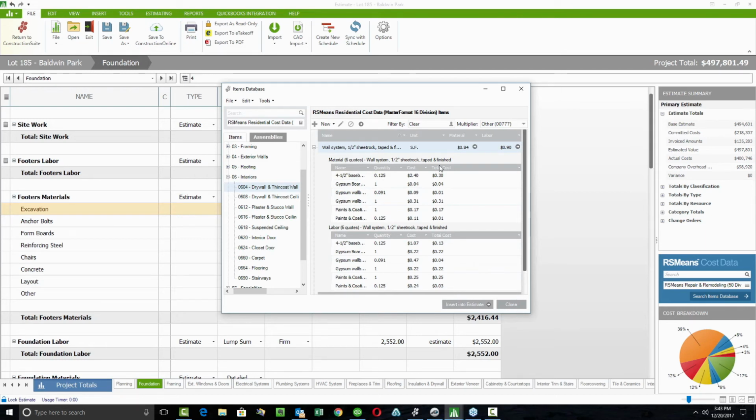We're getting a little bit specific, but if you just wanted to figure out your total cost for your interior walls, if we assume it's an 8-foot high wall, every 8 units of the assembly gives us 1 unit of trim. 8 feet high, 1 foot wide, so 1 linear foot of trim. For gypsum wallboard, we've measured this in square feet in the cost book, so 1 square foot of wallboard or sheetrock equates to 1 square foot of assembly, so we've got a value of 1.